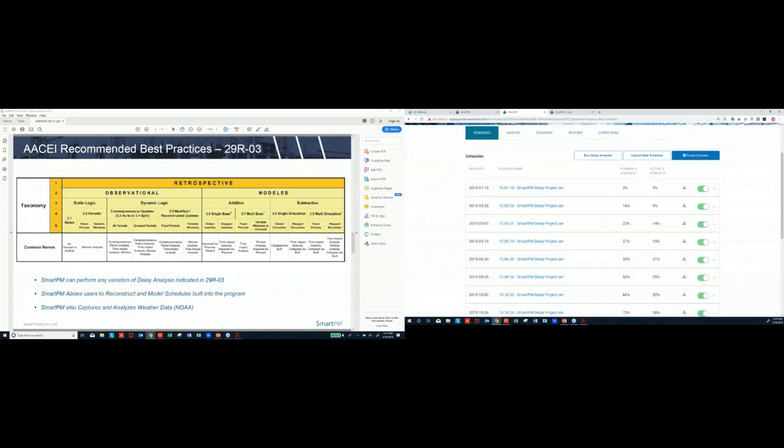That's when we just compare baseline logic with as-built data and understand, you know, statically what did the delays look like. We can break that up from, you know, the entire job to various periods throughout the job using contemporaneous data. But then we start getting into the contemporaneous updates and the modified reconstructed updates, this dynamic logic. This is where we're using every schedule that's out there. Contemporaneously, you can pick and choose, but use every schedule, don't touch them, analyze them, see what it tells you.